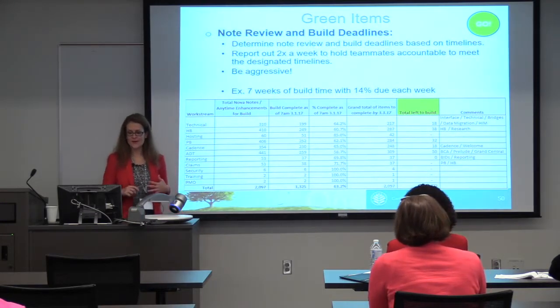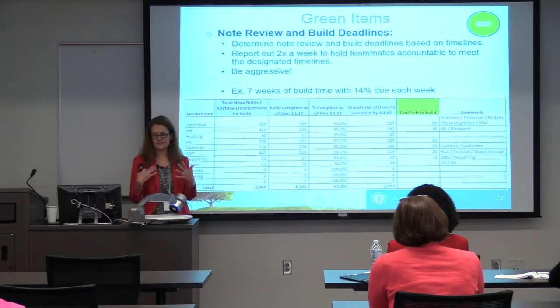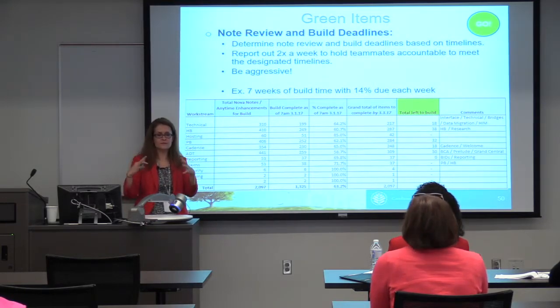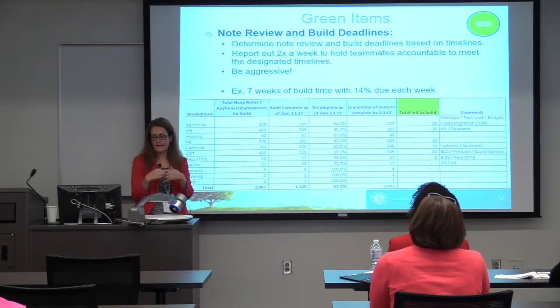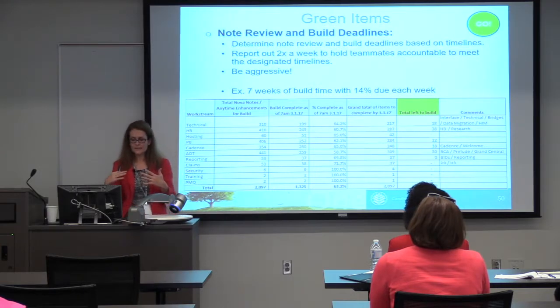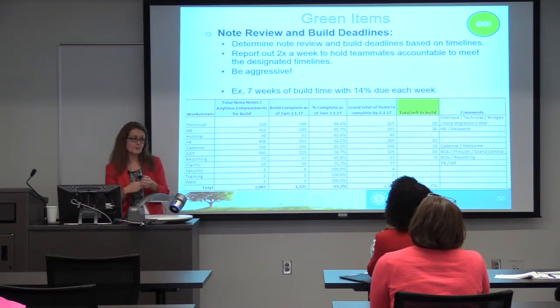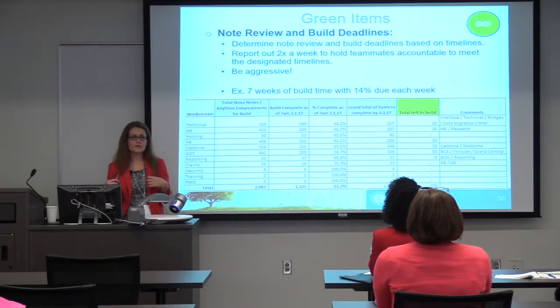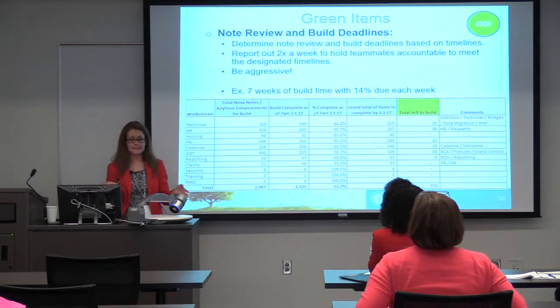Okay, so as I mentioned, the note review, build, testing, and training. In Epic's Nova, their user web module, you're able to do a lot of reporting. And so we had deadlines, of course, for everything to be done, and we reported out twice a week on where everyone was on their progress.